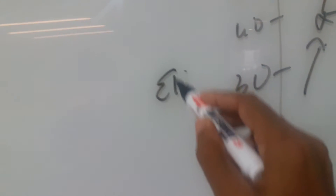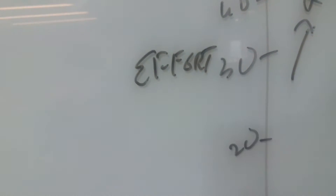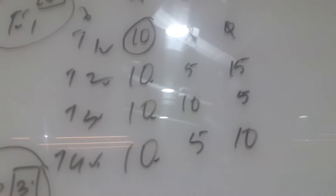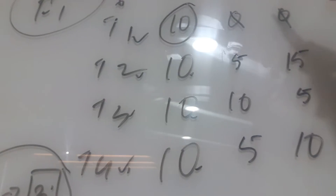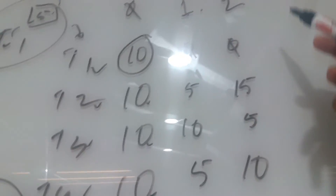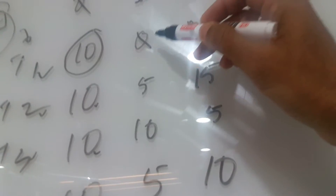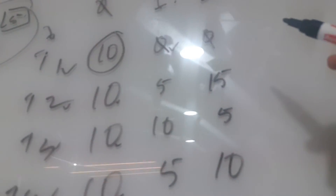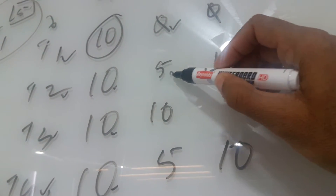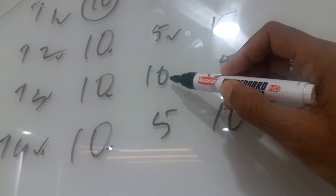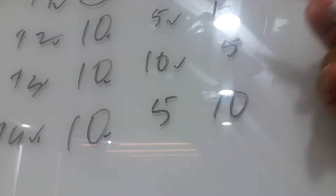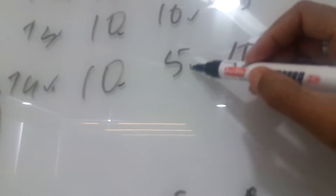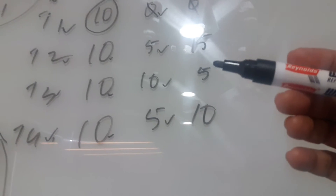The y-axis represents the balance effort to complete the sprint. Every day, engineers are allowed to update the balance effort. You fix a cut-off time, maybe 3 PM. After day 1, somebody says a task is 0 — meaning that task is done. Another task is 5, meaning they need 5 more hours. Another is 10, meaning nobody worked on it or they need 10 more hours. Every day, engineers give a revised estimate for completing the balance tasks, and every day we get a data point.